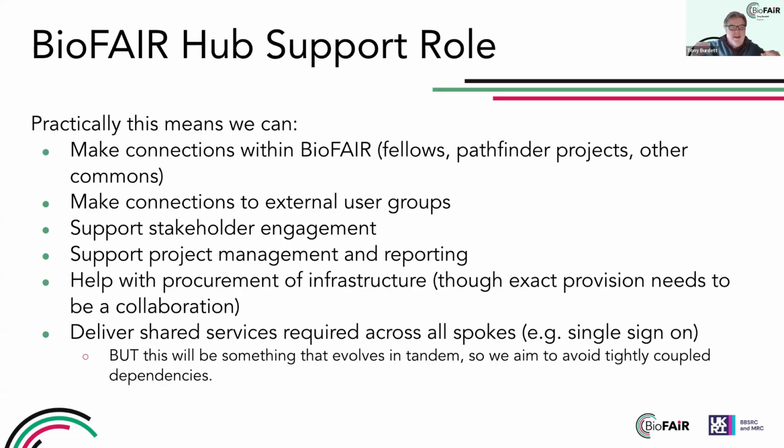So there's a little bit of thinking that I think all of our spokes will have to do about how to recognize that things are out of scope, but work around it in the meantime or in terms of delivering an MVP. If you can deliver an MVP that doesn't require sign-on, then that might be advantageous. We need to evolve those things in tandem, and we're still building capacity to deliver some of these services in the hub as well. So bear that in mind.